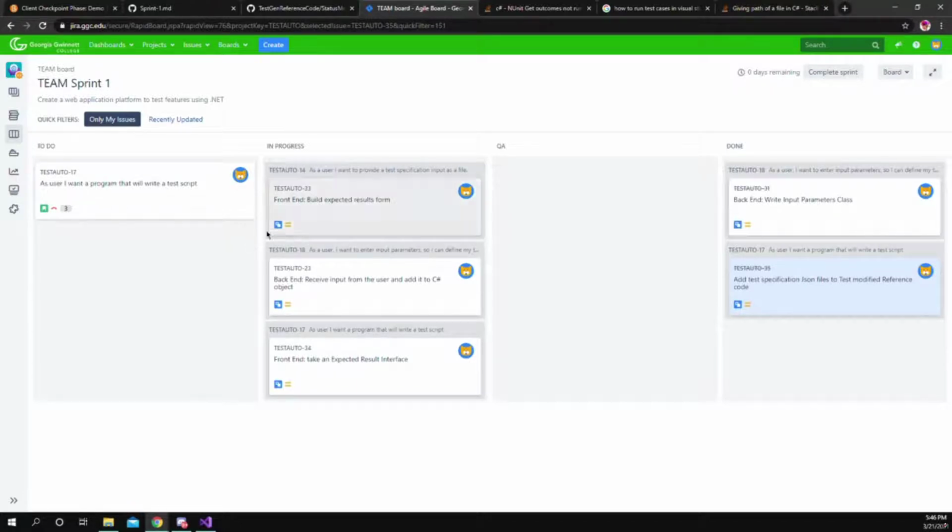And the reason being was, in our initial sprint, we wanted to divide the work kind of evenly, right? But we didn't realize how much work we were actually setting into the sprint. So I basically created a general task, which was kind of dumb, I know.